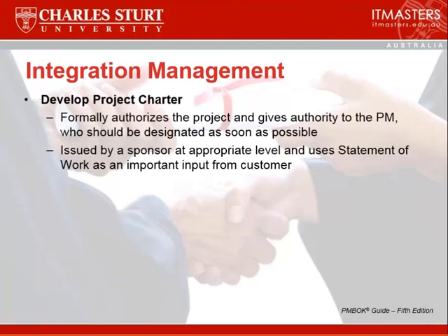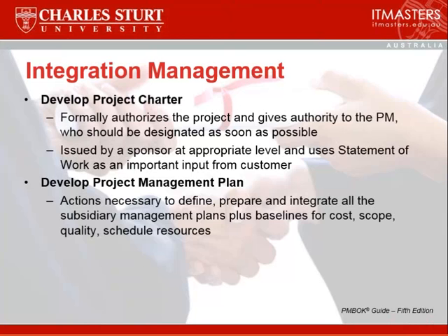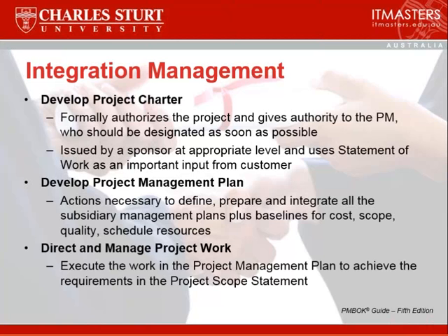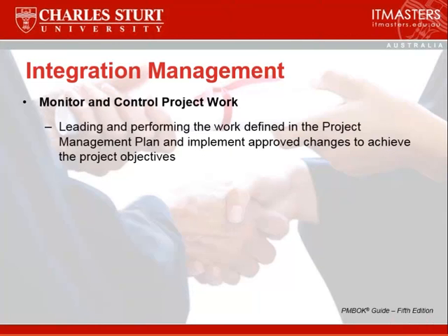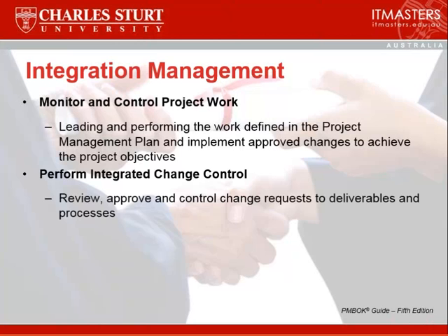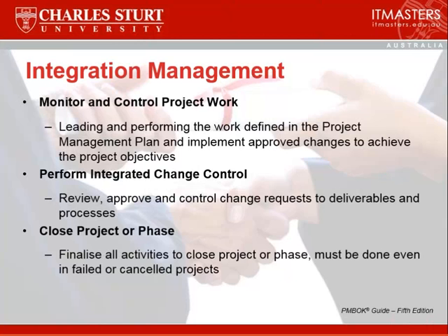Okay, first process is develop the project charter, and that really formally authorizes the project and is issued by the sponsor. The next process is develop a project management plan, a very important document. We'll discuss each one of these in a little bit more detail in a minute. The next process is direct and manage project work as you're up and running with the project. You need to monitor and control project work right throughout from the very start to the finish. And you perform integrated change control whenever you want to make changes to your original scope. And then finally you end up closing the project. These are all different processes the project manager has got to focus on under the guise of integration management.